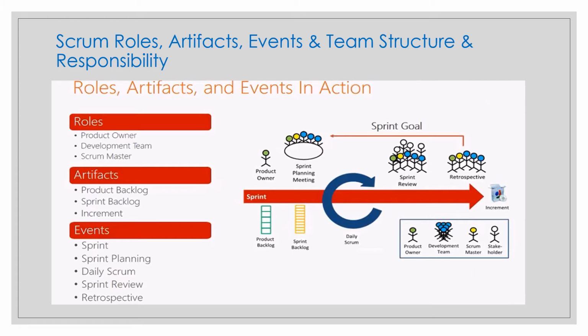The product owner ensures that attendees are prepared to discuss the most important product backlog items and how they map to the product goal. The Scrum team may also invite other people to attend sprint planning to provide advice, right? And sprint planning addresses these topics: why is this sprint valuable, what can be done in this sprint, and how will the chosen work get done.